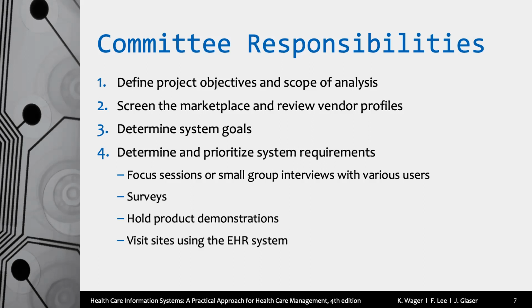Truth be told, what happened was, I did a big project that lasted 9 months. The project was worth several million dollars. And when the project came to an end, the CIO at the hospital that we did the project for refused to pay us. And his rationale was, well, that's not what I agreed we were going to do. We got our attorneys involved, got their attorneys involved. And the statement finally was, well, Dave, where do you have it in writing that this is exactly what would be done? And I said, well, I've got some emails. And they said, no, that's not binding.